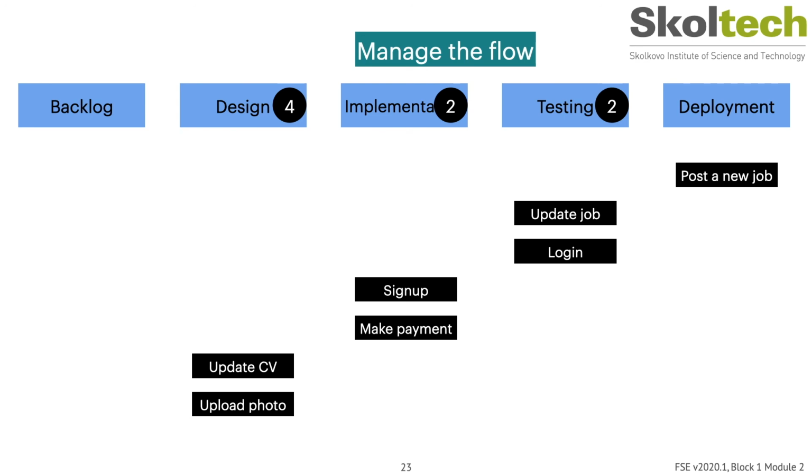Now, if this issue occurs occasionally, then the developers can basically go out and help the testing team test their code. But if this is a permanent problem that will happen again, then you want to manage the flow. How do we manage the flow? If it's a permanent resource issue, then we may add more people to testing to basically increase the capacity of the work in progress limits in that particular stage. Or if it's buggy code, then what can we do in development so that we don't have that many defects and then it moves faster?